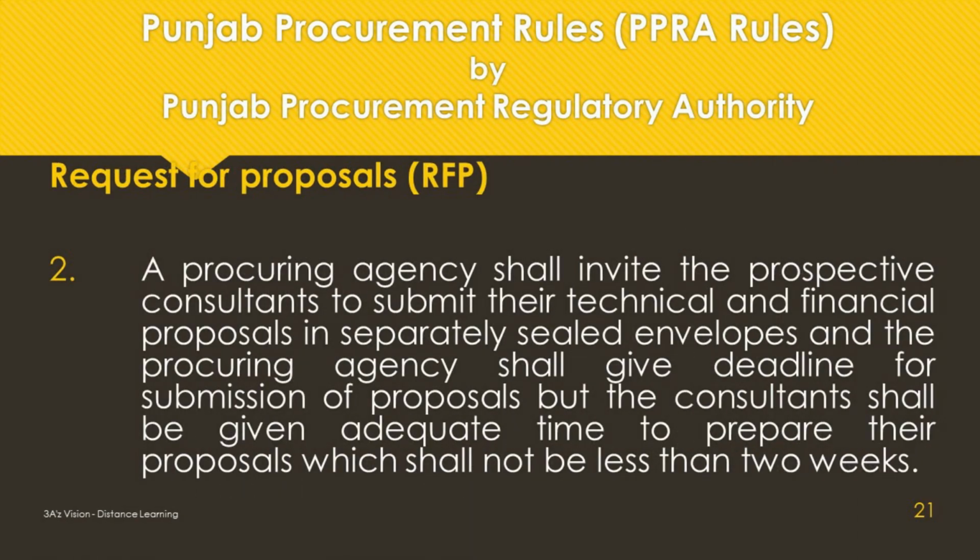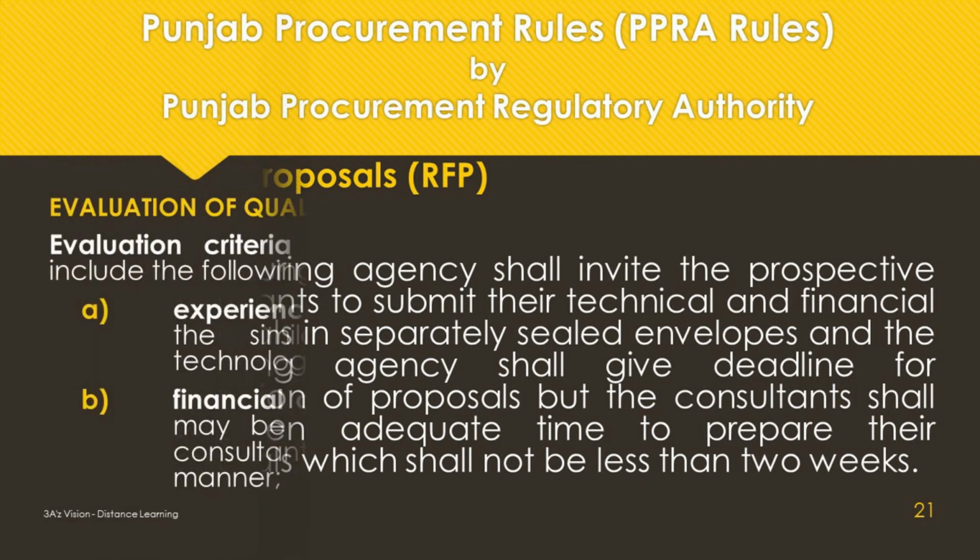A procuring agency shall invite the prospective consultants to submit their technical and financial proposals in separately sealed envelopes, and the procuring agency shall give a deadline for submission of proposals, but the consultants shall be given adequate time to prepare their proposals, which shall not be less than 2 weeks.